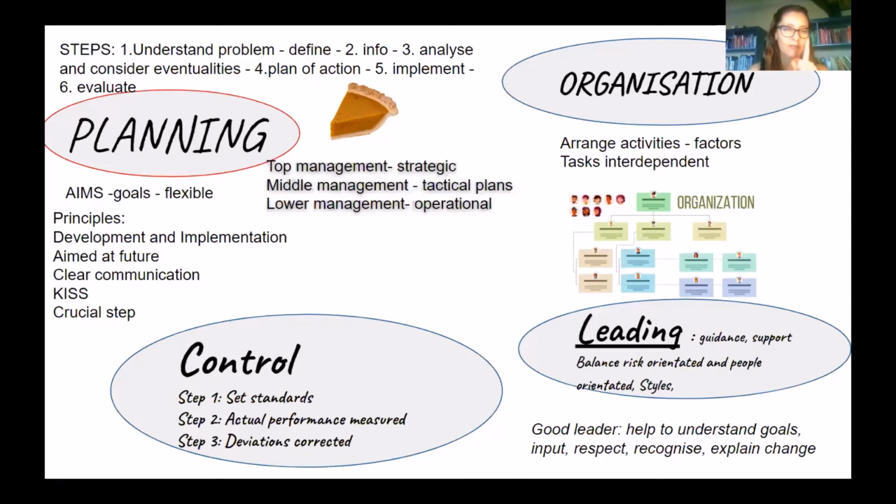Remember that in grade 11 for project management. So you have what is the task, who's responsible, the date to start the task, the date it must end, so how many days are you giving them to do that, and then you plot it onto a project management program. So that's the fourth step, is plan of action.